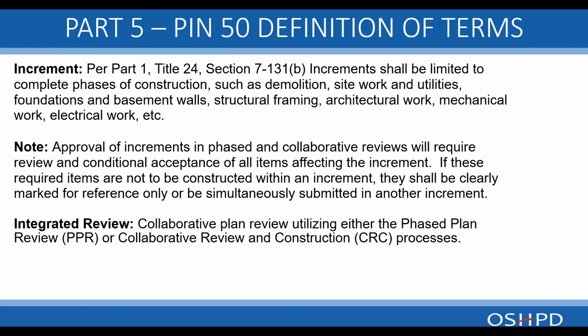Note that approval of increments in phased and collaborative reviews will require review and conditional acceptance of all items affecting the increment. If these required items are not to be constructed within an increment, they shall be clearly marked for reference only or be simultaneously submitted in another increment.